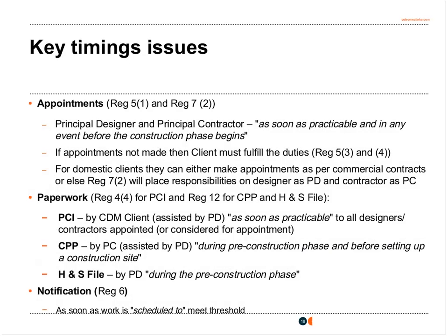Looking at the key timings in relation to CDM 2015, we've already touched on some of these issues. In terms of the appointment of the duty holders, the principal designer and principal contractor need to be appointed as soon as practicable: the principal contractor before the construction phase begins, and the principal designer before the design stage begins. If the appointments aren't made, the client must fulfil the duties that would otherwise be taken on by these duty holders. And there are specific arrangements for domestic clients.